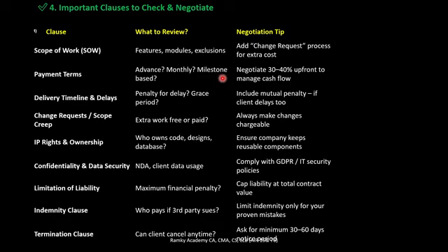So if there is any kind of delay in terms of payment, they levy a penalty as well. If they delay 30 days beyond the payment, for each day or for the overall invoice amount, there will be 1% of extra charges, penalties should be paid by the customer to the supplier.